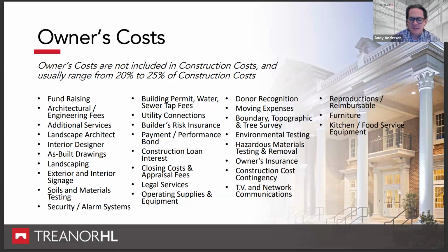You've got lots of unforeseen existing conditions that are behind walls. You have antiquated, potentially MEP, mechanical, electrical, plumbing systems, hazardous materials. There's a lot of things that you can't predict or be aware of until you start the project. So for a renovation, we recommend you hold at least a 10 to 15% contingency at the start of construction for those kinds of projects.